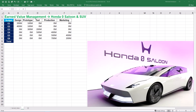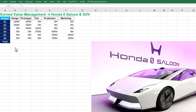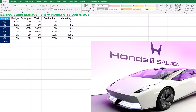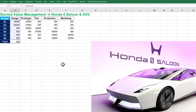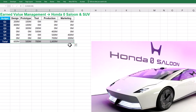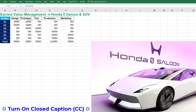We can find the planned value or PV for each activity, which is also called budget at completion or BAC. For design, planned value is the sum of budget over six quarters, which is $600 million. We should then replicate the formula for other project activities. We now have an objective measure of the planned progress and a baseline to measure actual project performance against it.